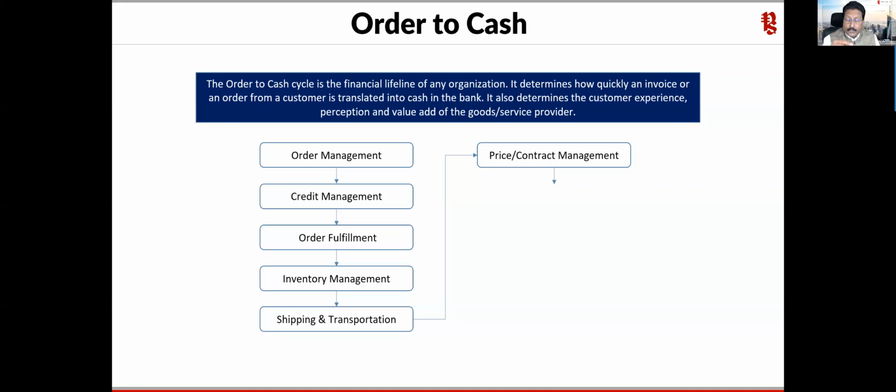Now there will also be a clause, because if the price increases, the supplier is going to be at a loss, and if the price decreases, the buyer is going to be at a loss. So generally in this kind of price contract, they agree on a standard price at which it has to be supplied. Now there will be an additional clause where, depending on the value and quantity of material, there will generally be a price escalation or de-escalation cost of 5 to 10%.